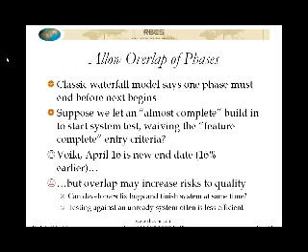Okay, well, one thing you can do is flex the rules of the software development lifecycle model that you're following. Okay? So if you're following a V model or any other kind of waterfall model, then the rules there would be that you finish one phase before you start the next. So what you could do is say, well, instead of having the feature complete rule apply for starting system tests, because usually in a V model, you insist that all the features be done before you start the system test, we're going to define a core set of features that we want done before we start system test. The other features can drop in as we go along.